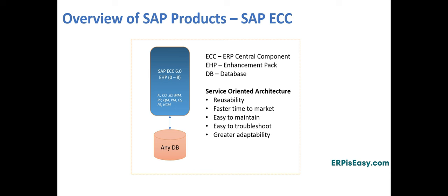As an example, consider the following system landscape. Functional consultants will configure the business processes in the development system. The configuration changes will then be transferred to a different client within the development system to perform the unit testing. Unit testing is the first test performed after something has been configured in the development system. The initial basic level of testing is completed quickly before the next level of detailed testing begins. Client 300 in this example is the development client and client 400 is the unit testing client.